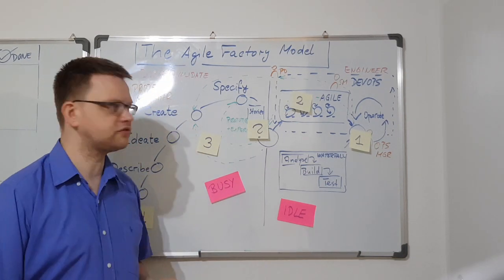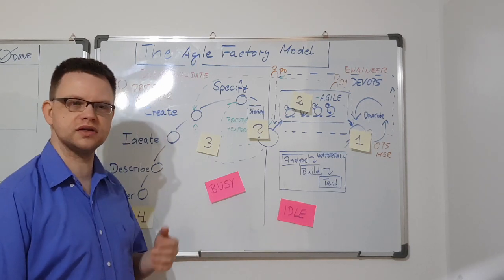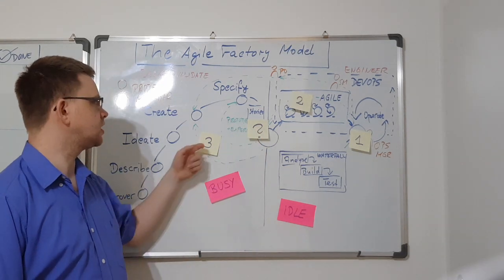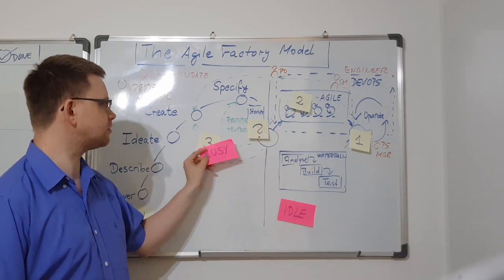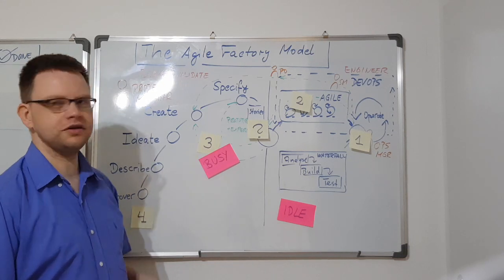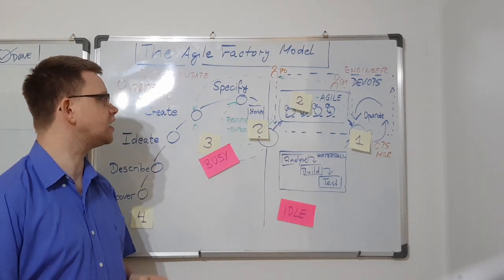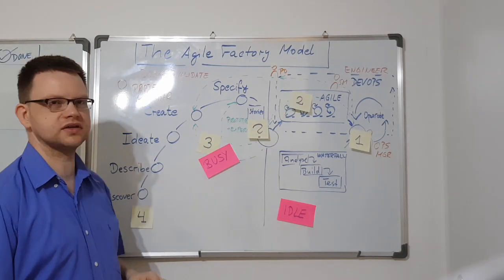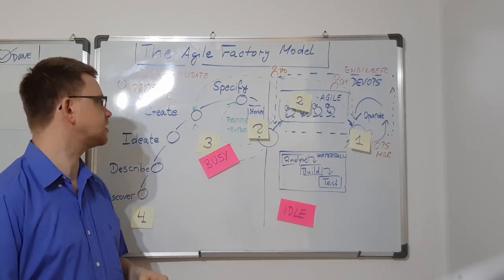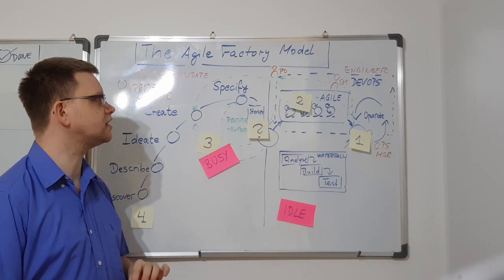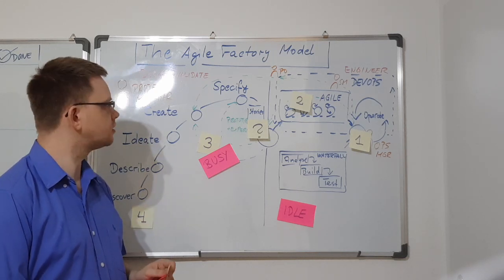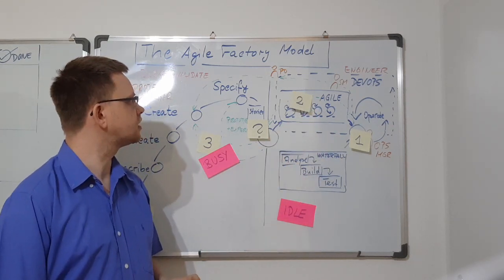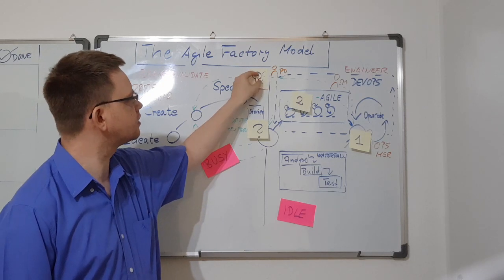The other alternative, if they want to make sense, is to not be busy for the question and instead be busy with the question towards item 3, which will then, of course, be delayed. So any questions, any feedback will be causing delay to the next item in the pipeline in the design and validate process.